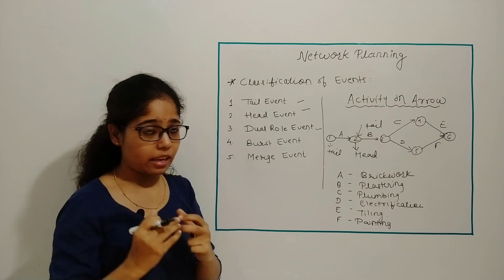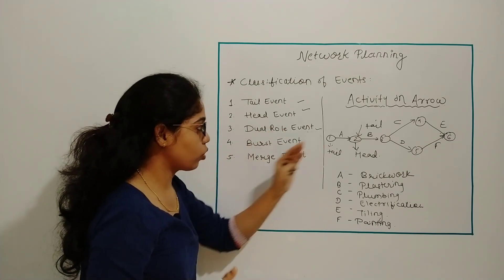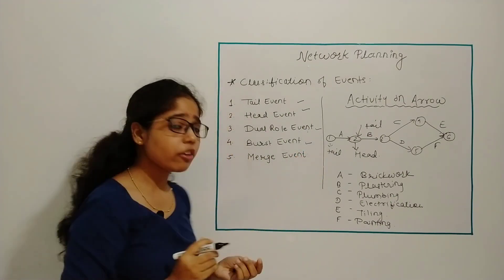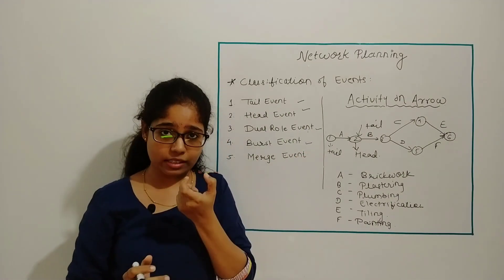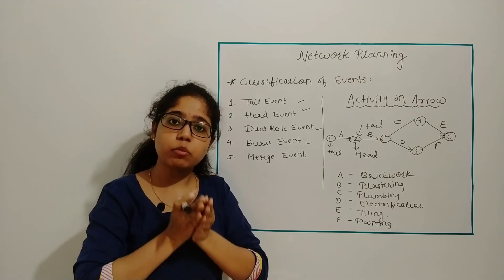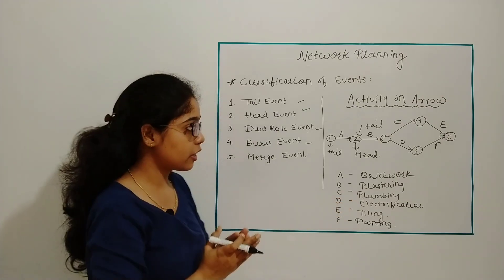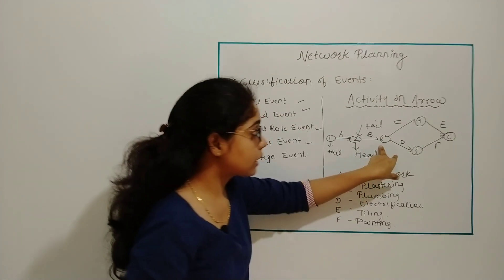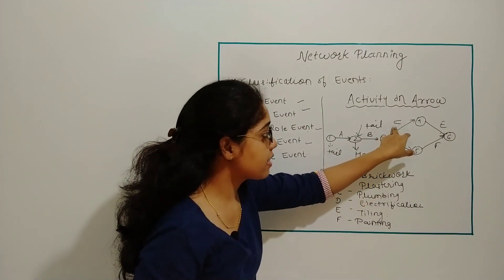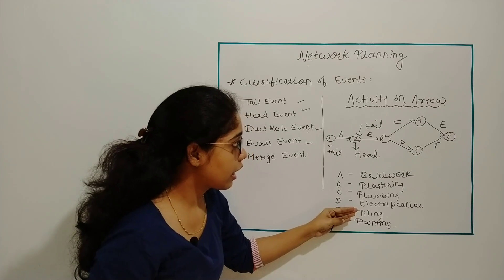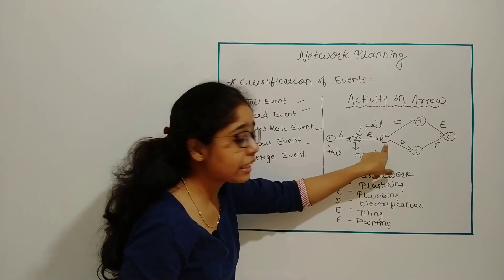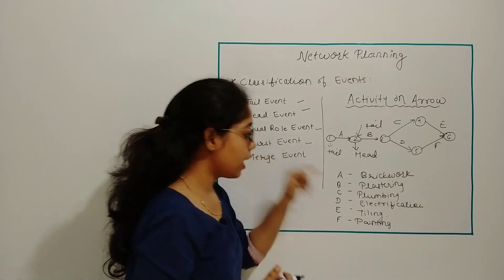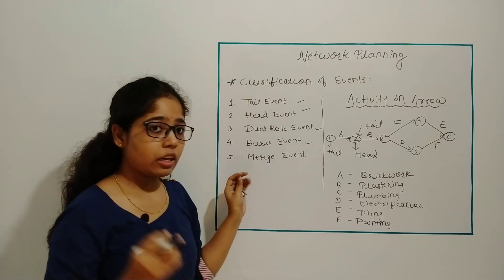Fourth is your burst event. If from a single node or single point I am starting more than one activities, then it is called burst event. Like here you can see from node 3 I am starting activity C and D, that is plumbing and electrification work. So that node 3 is called your burst event.